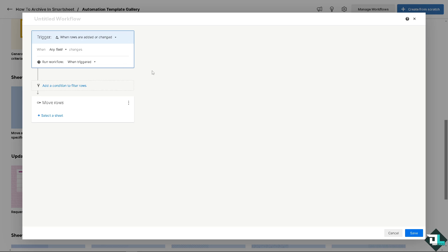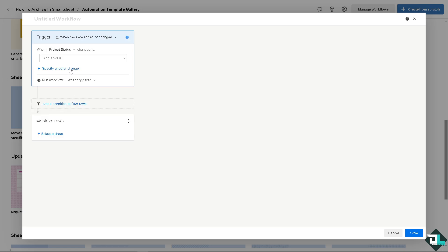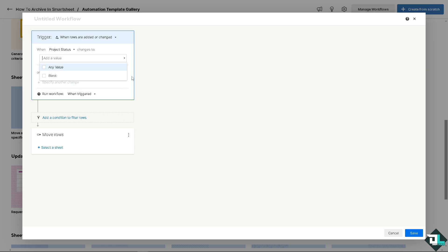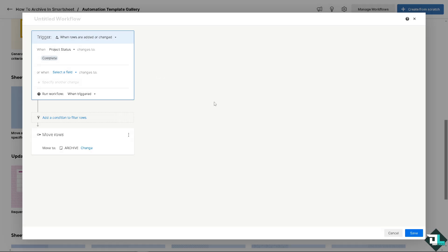Once you're in the template, set the trigger: when rows are added or changed. Click on the field and choose Project Status as the field. Set the value to 'Complete.' When the project status has been completed, you need to move that row to a specific sheet — search for the archive sheet and select it.